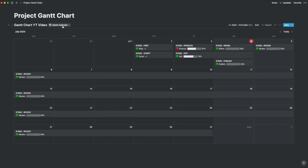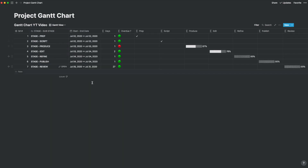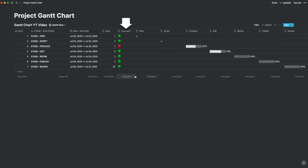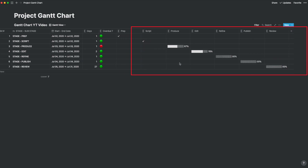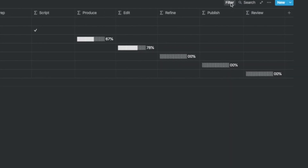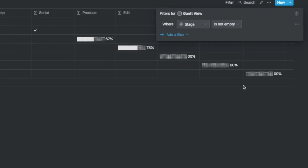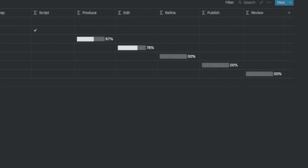Another neat view is the Gantt chart view, which is a table view. In this view you will see the tasks, the start and end date, the number of days, the overdue flag, and the seven progress bars in a Gantt-type waterfall fashion. The filter used is where the stage is not empty, and all other columns are hidden.